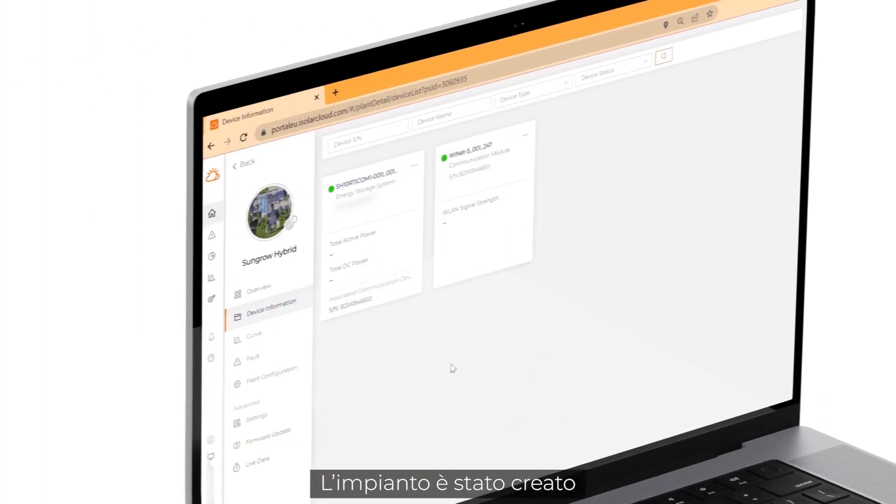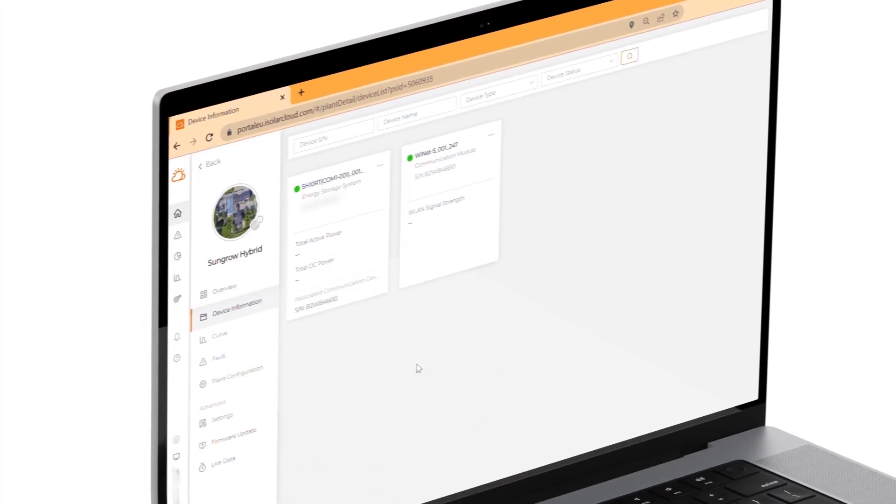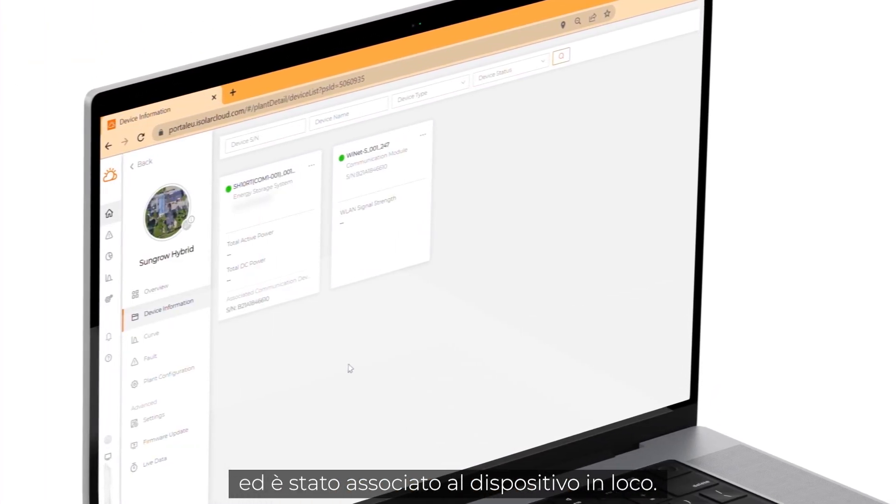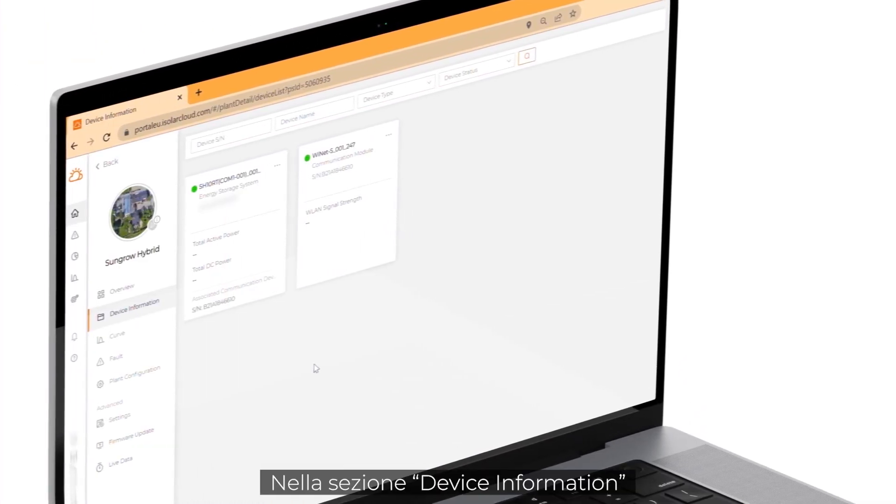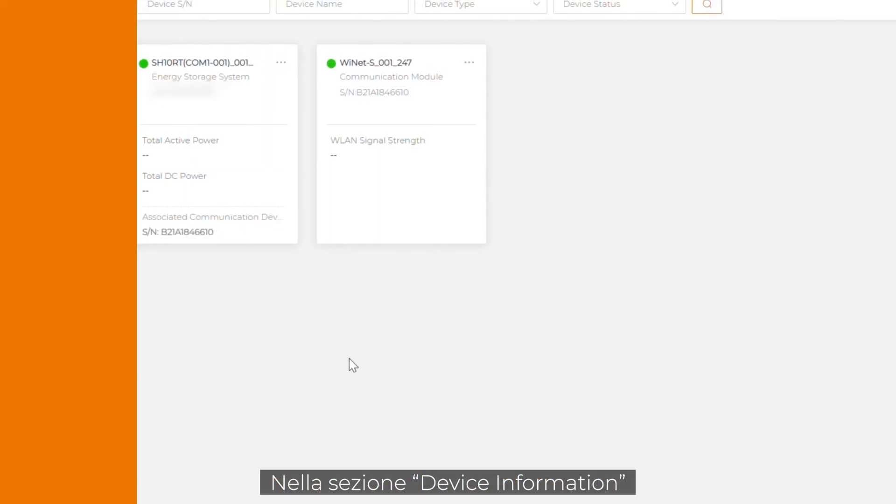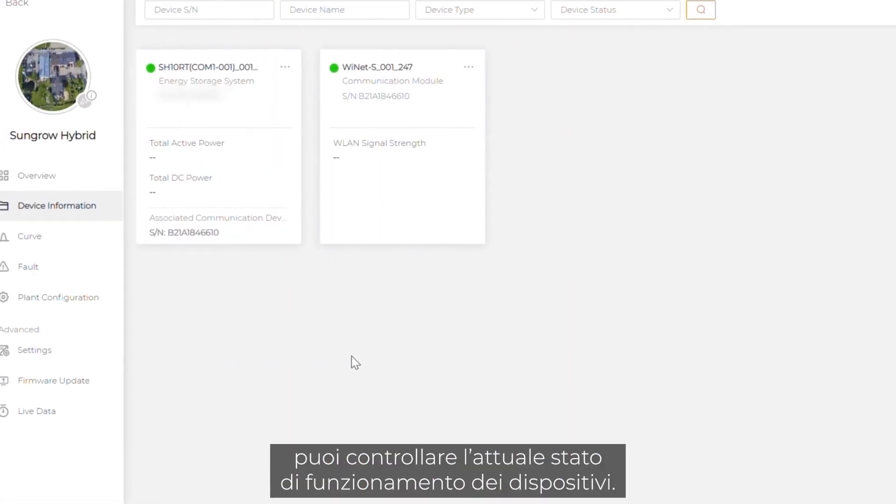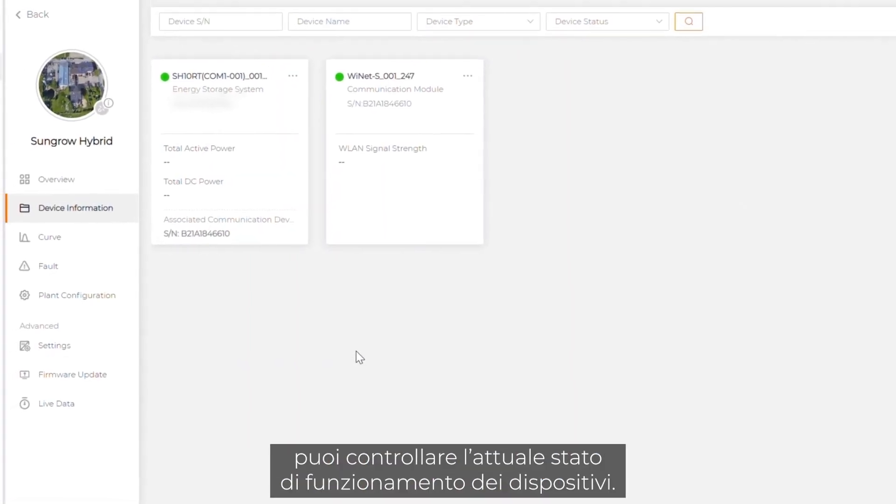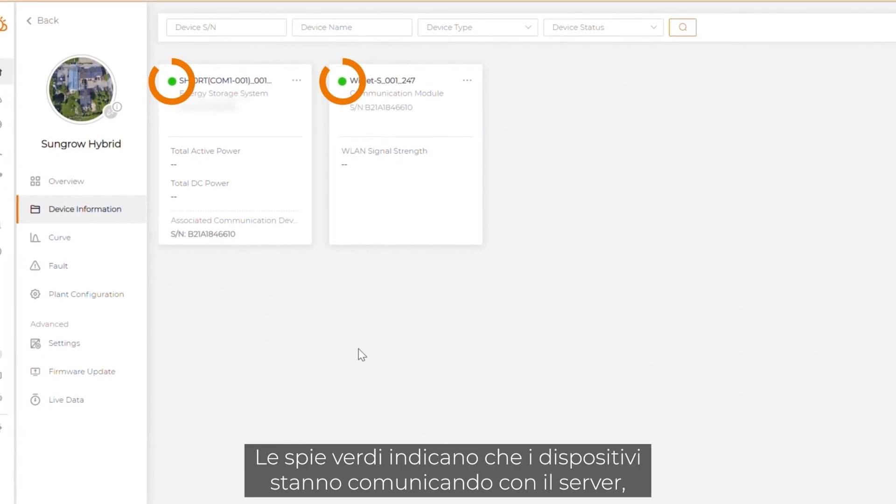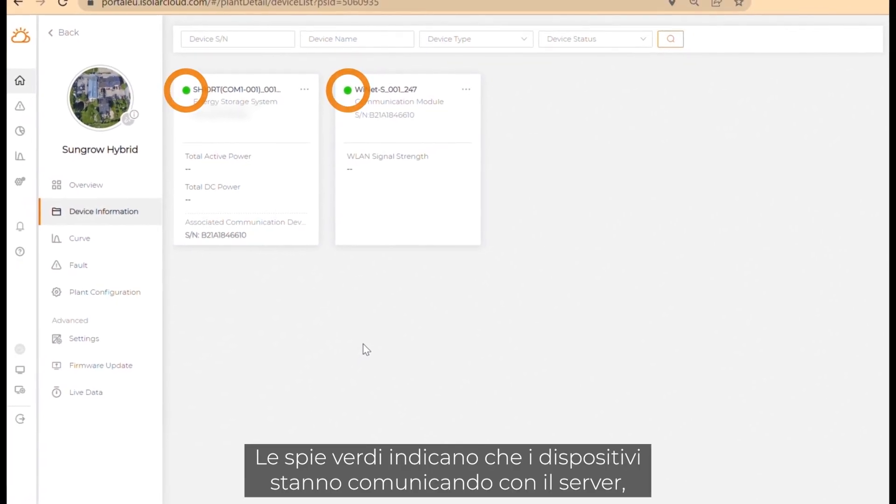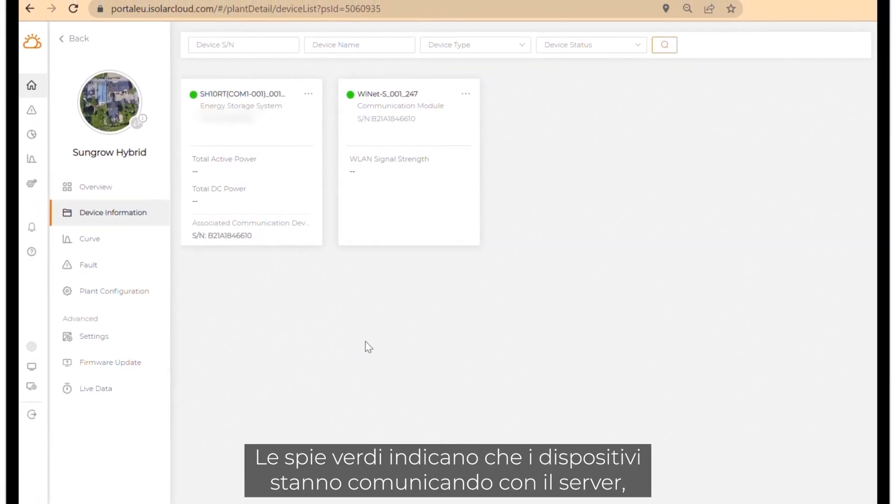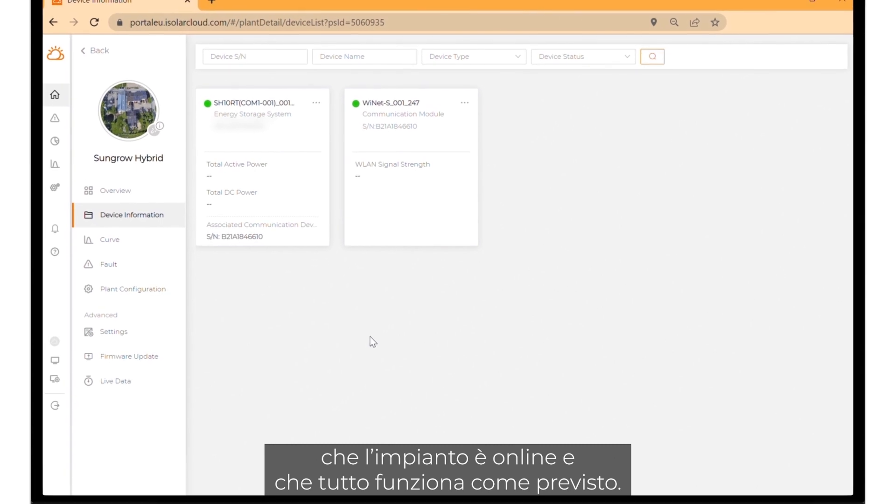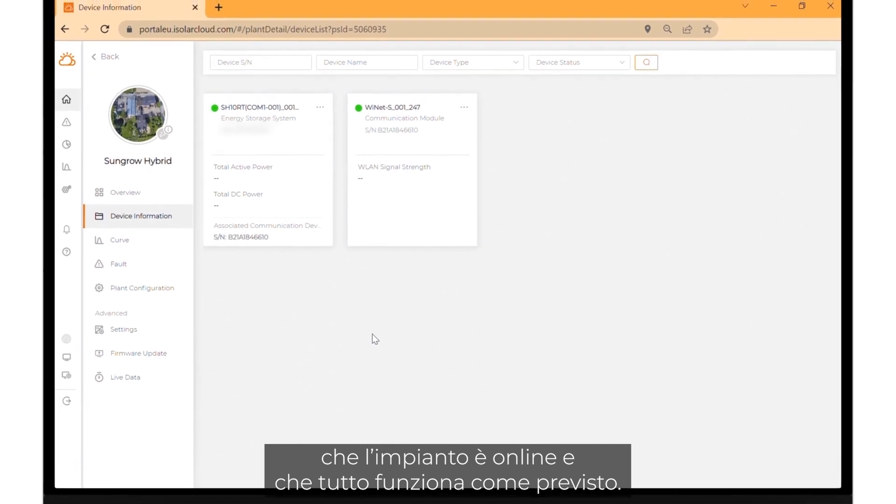Your plant was created successfully and has been paired with the device on site. In the device information section you can check the current working status of the devices. The green lights indicate that the devices are communicating with the server. The plant is online and everything is working properly.